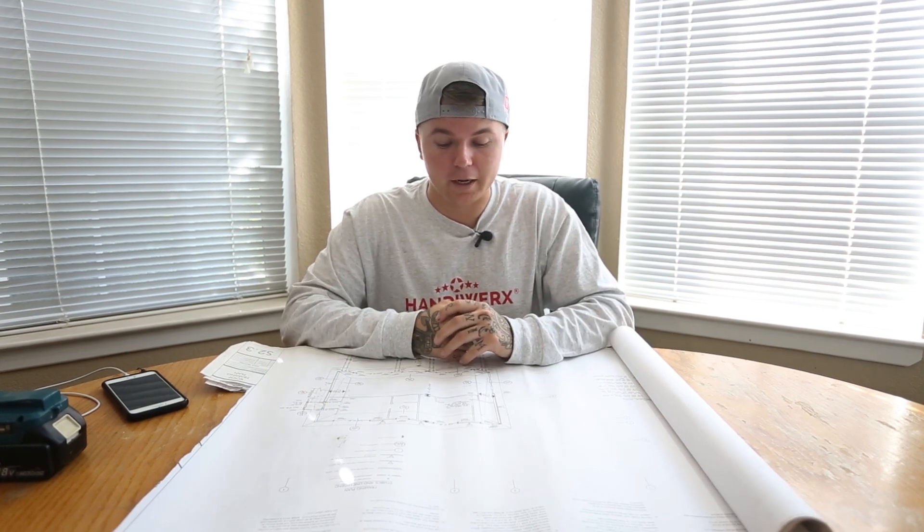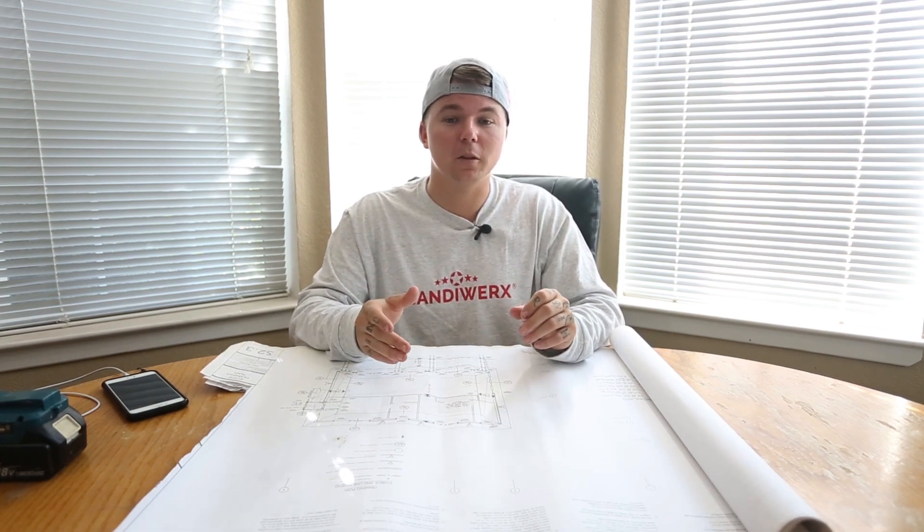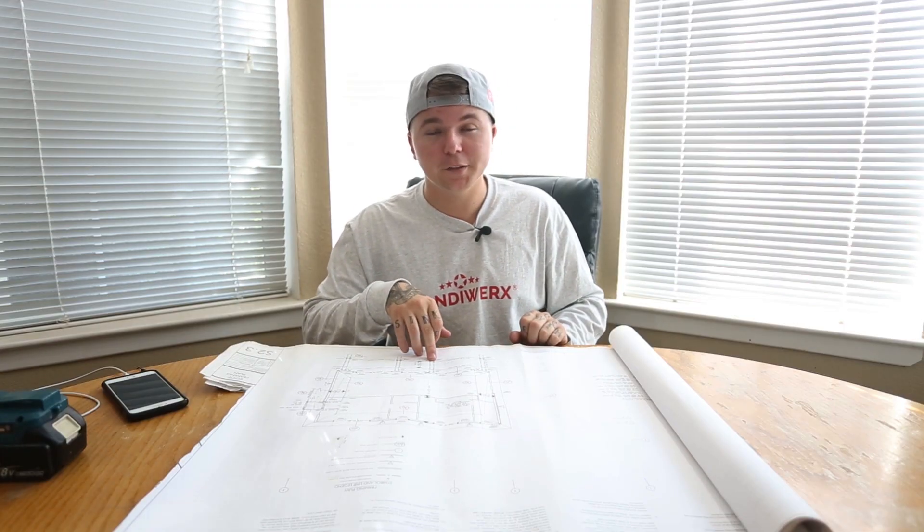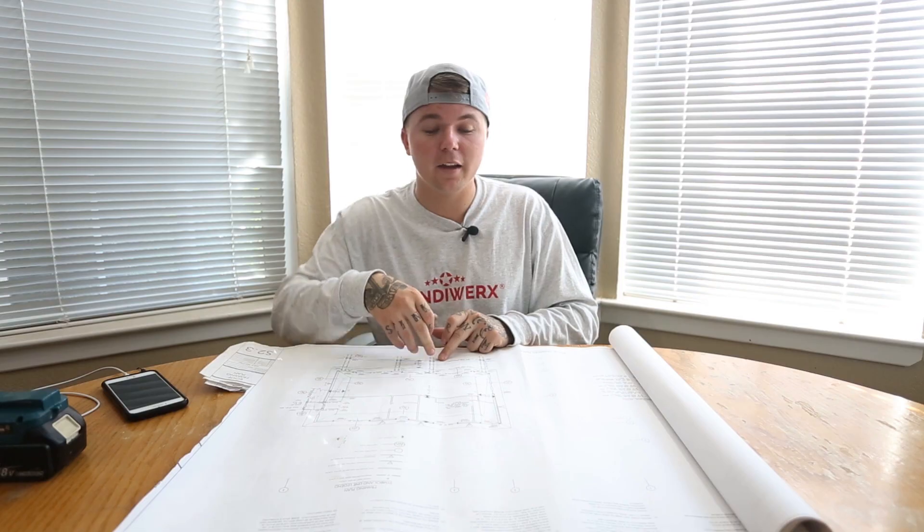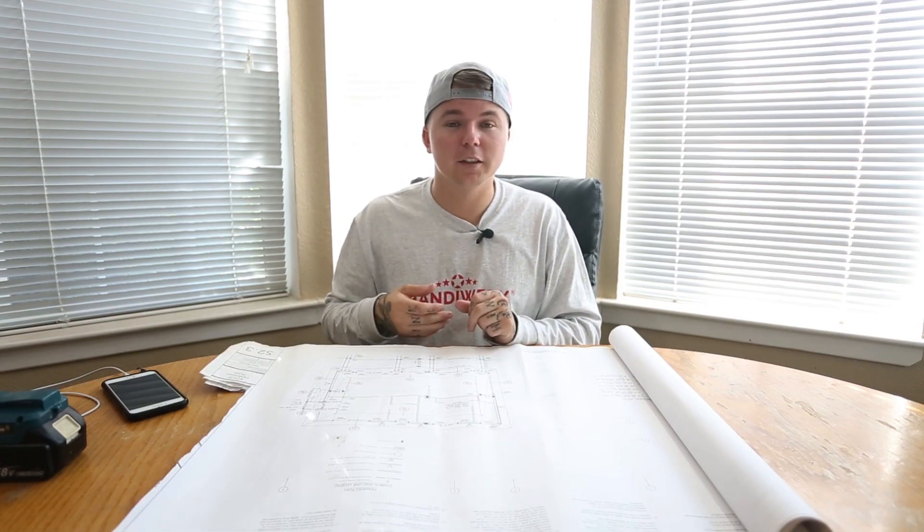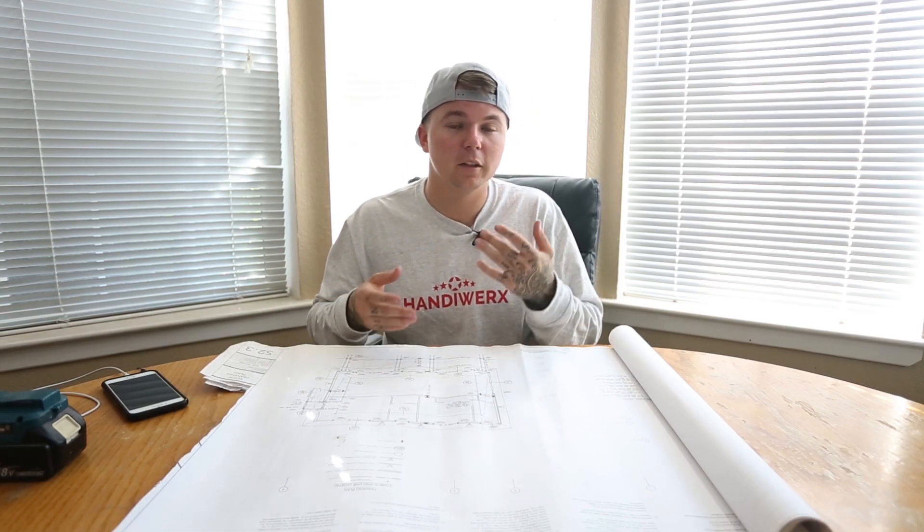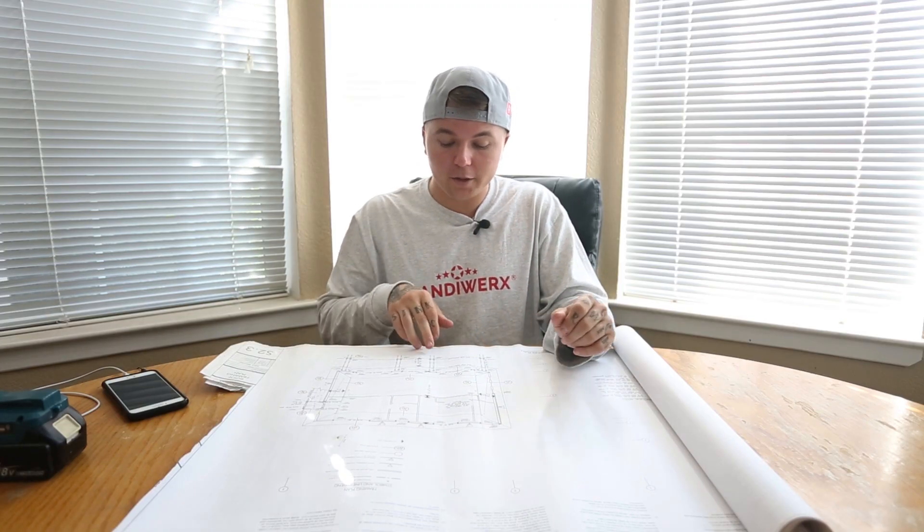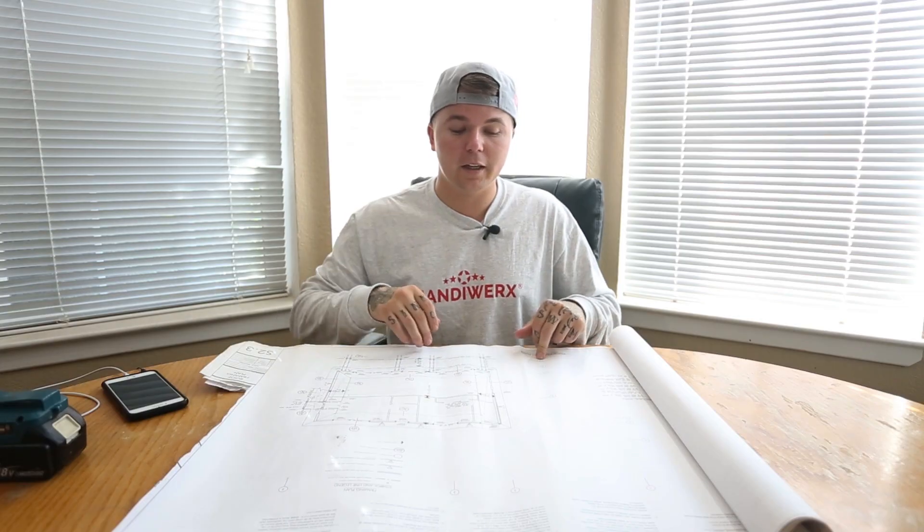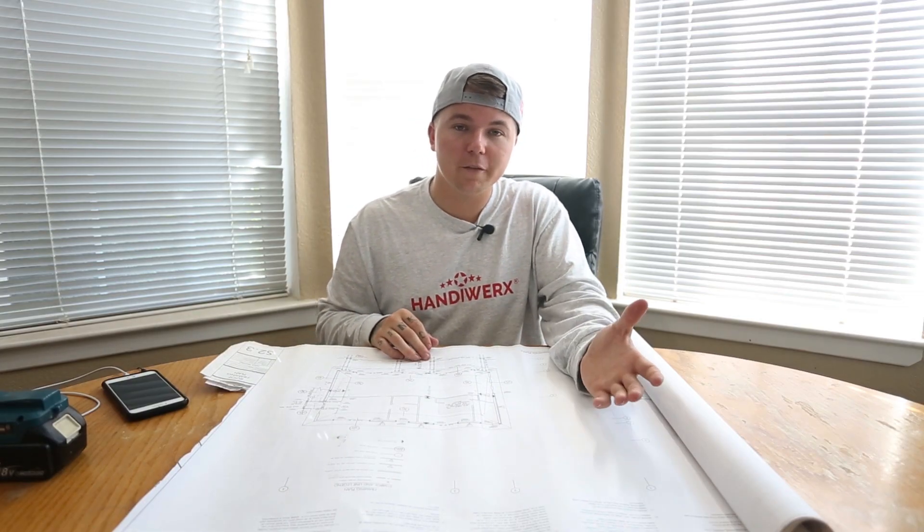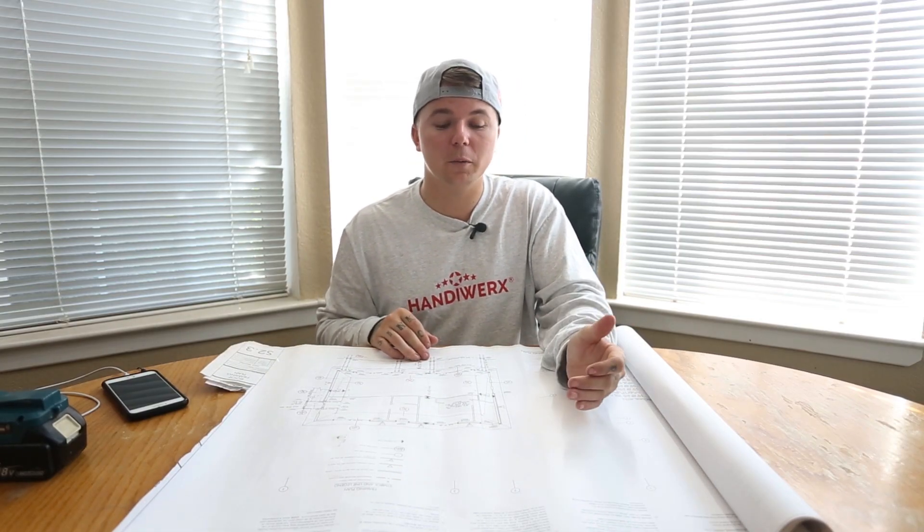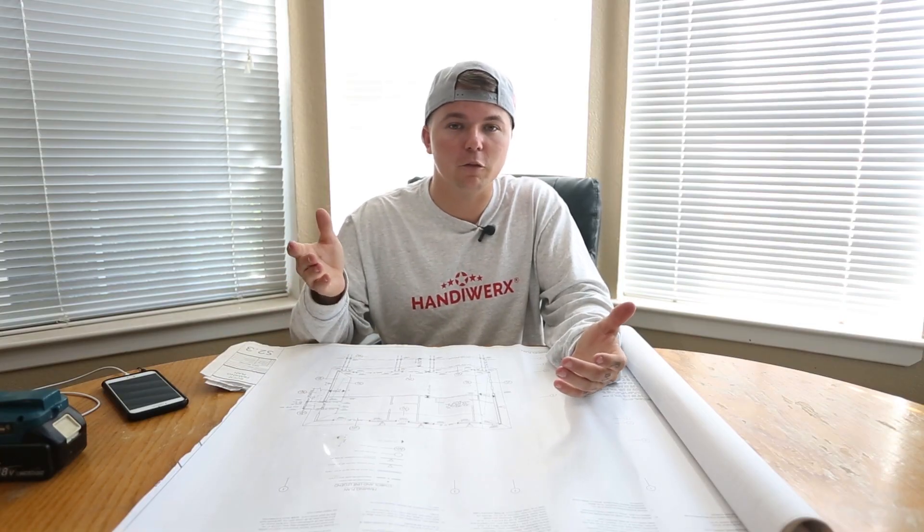And lastly we learned about grid lines today. Say you have a problem in a specific location. Like we used as an example today, this 6x6 post out here. You'd reference grid lines A and 3 and say hey this 6x6 post isn't working out. What can we do? From there they'll get back to you and they know that you're referencing this 6x6 post because you use those two grid lines. Instead of saying I'm having trouble with this 6x6 post, what can we do? What 6x6 post? You've got 50 of them in this house.